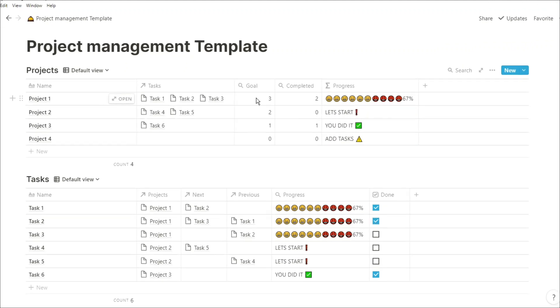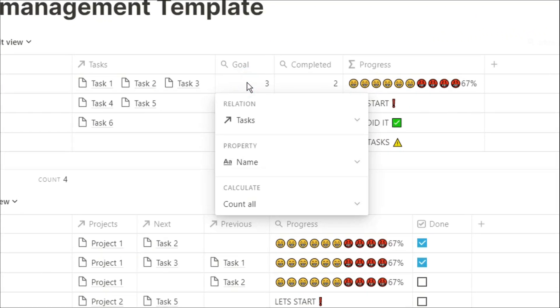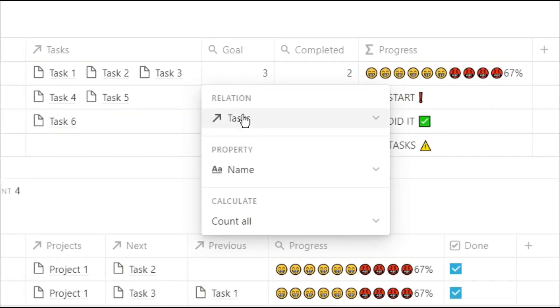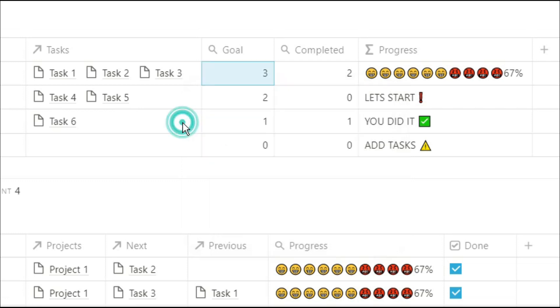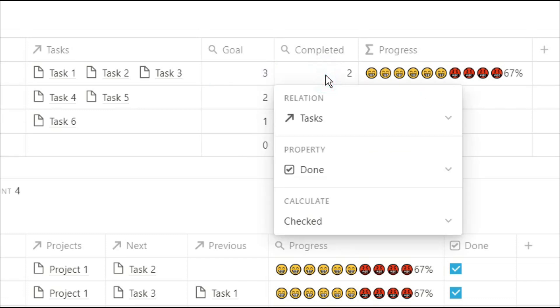Then next to the task column, I have a roll-up, which essentially takes the information from my task database and shows it in my project database. This specific roll-up is actually telling me how many tasks I have to do in this specific project. As I add tasks in, the number will increase.